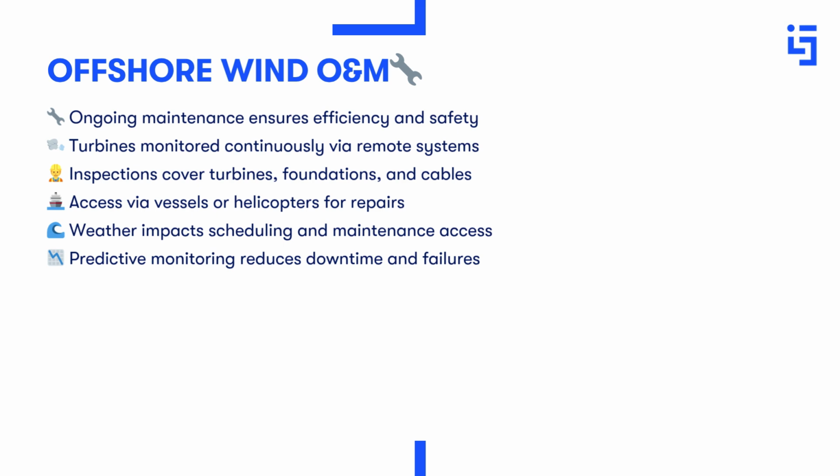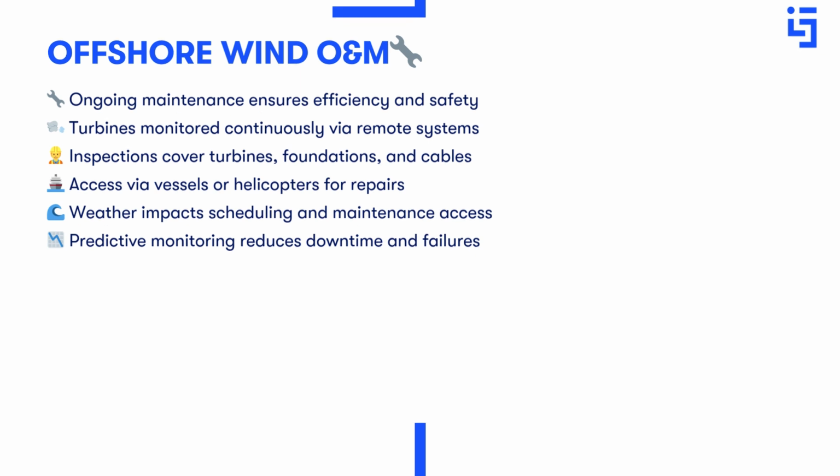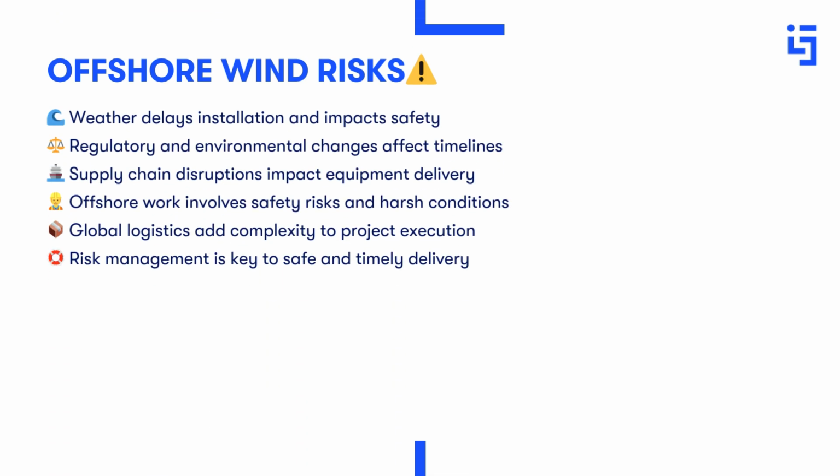Offshore wind farm construction, despite increasing standardization, remains exposed to a range of uncertainties and hazards that can affect timelines and project outcomes. Weather conditions are the most significant source of uncertainty. Storms, high winds, and rough seas can delay installation, damage equipment, and in extreme cases, cause structural impacts. While forecasting helps identify suitable windows, unpredictable conditions remain a constant challenge.